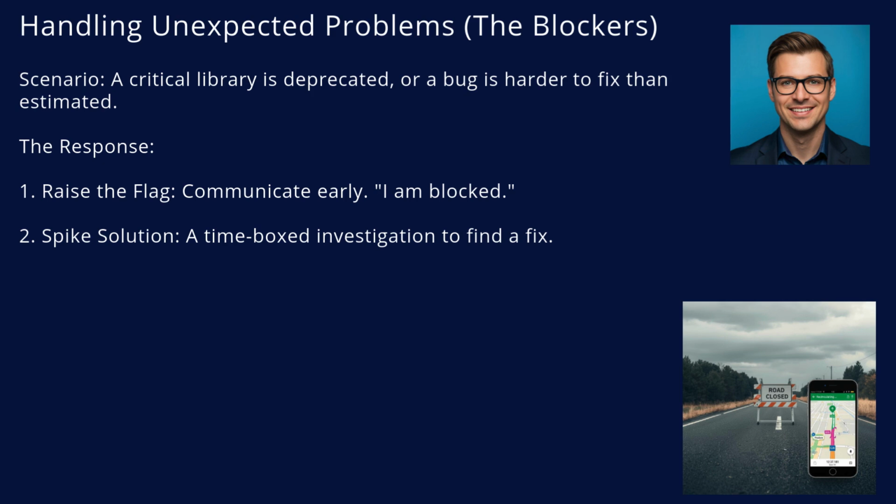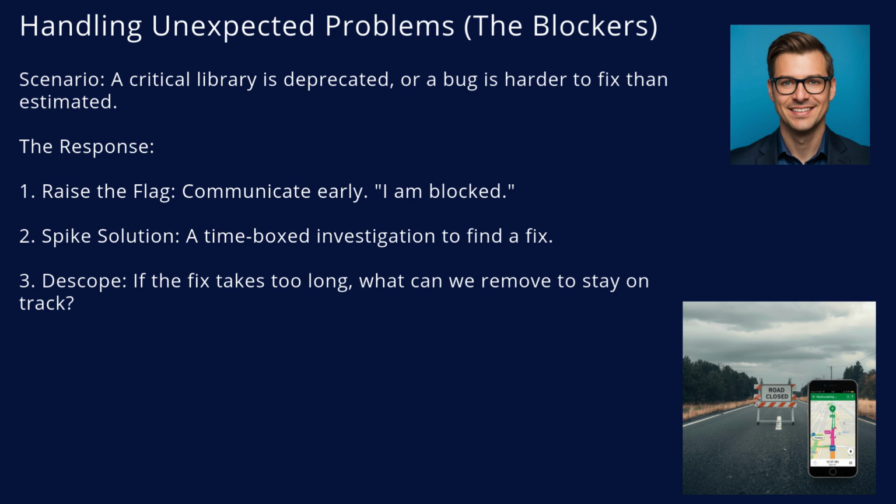Spike solution. Propose a short, time-boxed investigation, a spike, to find a workaround. The scope. If the spike shows the fix will take a week, you must ask, what can we remove from the sprint to stay on schedule? You trade scope for time.